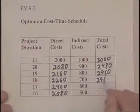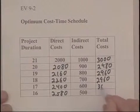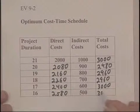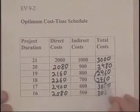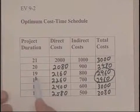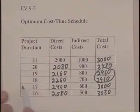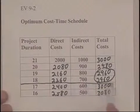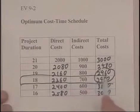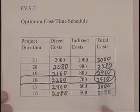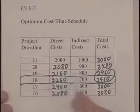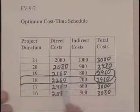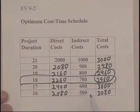The totals come out to $2,960, $3,000, and $3,080. We have a tie between period 19 and period 18, so the optimum time period would be 18 — since for the same amount of money we can knock another time unit off. We always want to take into account both direct costs and indirect costs.